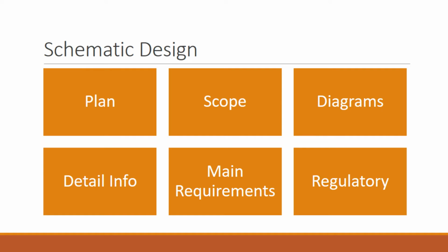Now in this subphase, it builds on the previous one while providing the additional information needed to generate a more accurate budget. This is frequently the best level or phase for creating annual capital budgets. And depending on the complexity of the project, the design documents normally required at this stage reflect 5 to 25% design completion and often contain the deliverables as shown in front of you right now.